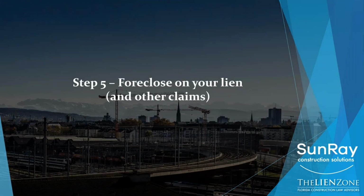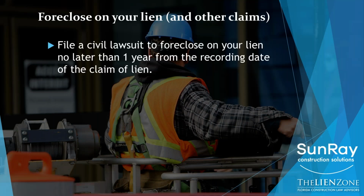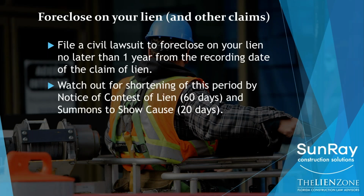Okay, so now we've touched all the bases. We know that our lien is proper and it's been recorded. Now what? Now you need to file a civil lawsuit to foreclose on your claim of lien. And this needs to be done no later than 1 year from the recording date of the claim of lien.